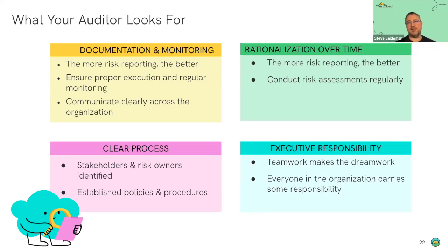And then I think Frank mentioned, right, a lot of times people will say, hey, we're going to mitigate this risk, but in reality they're accepting that risk because their mitigation strategy is 2 years long. Or it just never happens, right? We set some sort of timeline that we allow to lapse. So ultimately acceptance is the de facto strategy, as opposed to what you think your strategy is.